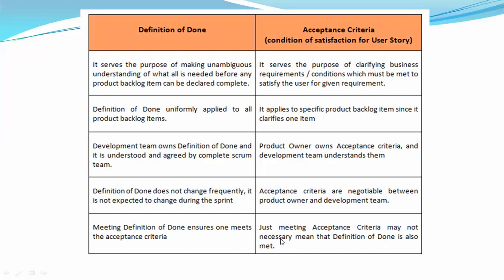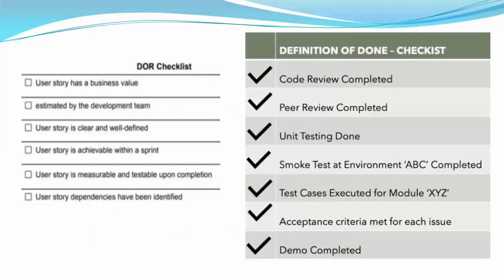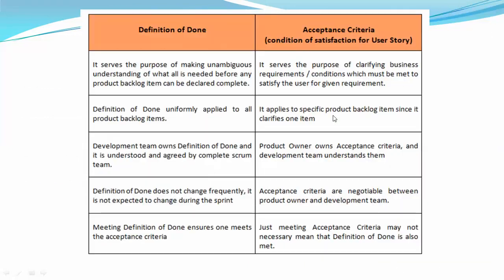The definition of done is a checklist. All the conditions should be satisfied. So always have this in mind. See here, the definition of done checklist. We have one point that acceptance criteria is met for each issue, right? But the vice versa is not correct. That is what is mentioned in this point. Okay, let me